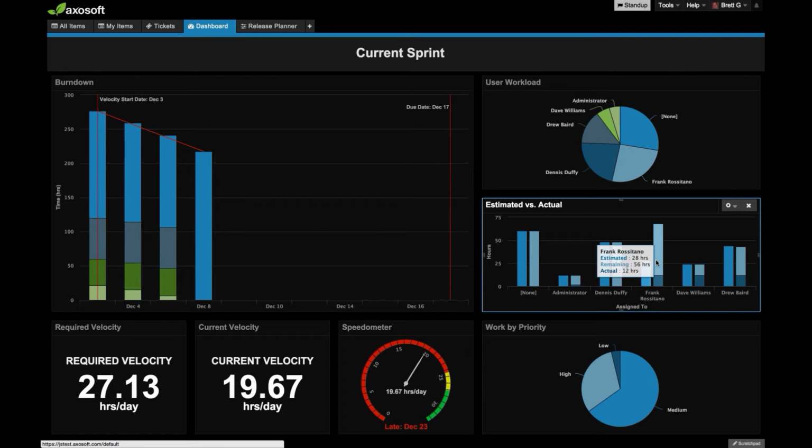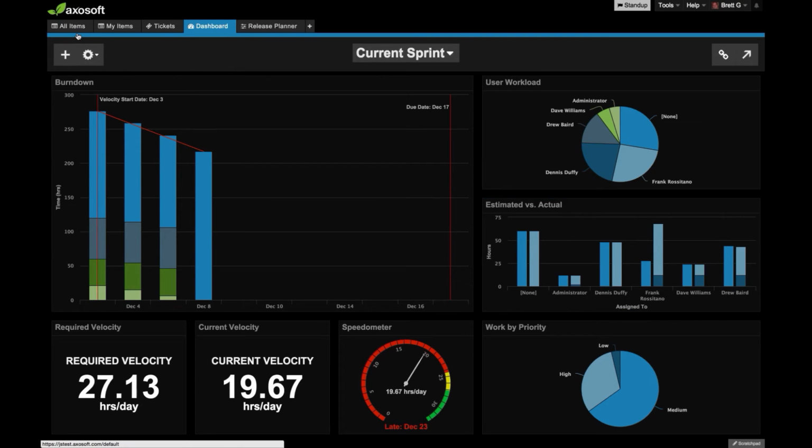This is how much work was actually remaining, and this is how much work I'd actually done. So, of course, ideally these should be equal, but if they're off by any measure, that just means we were estimating time differently than how much it was actually taking us.